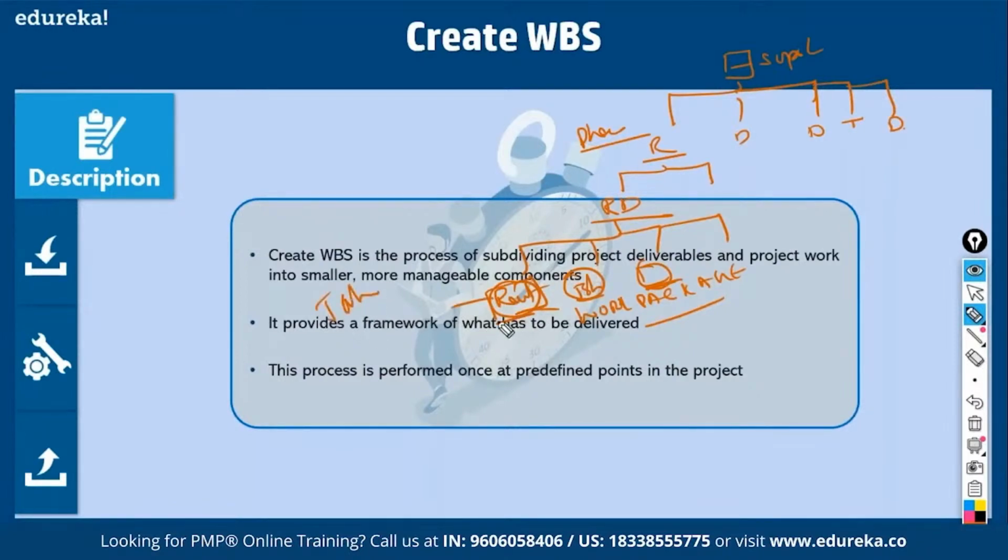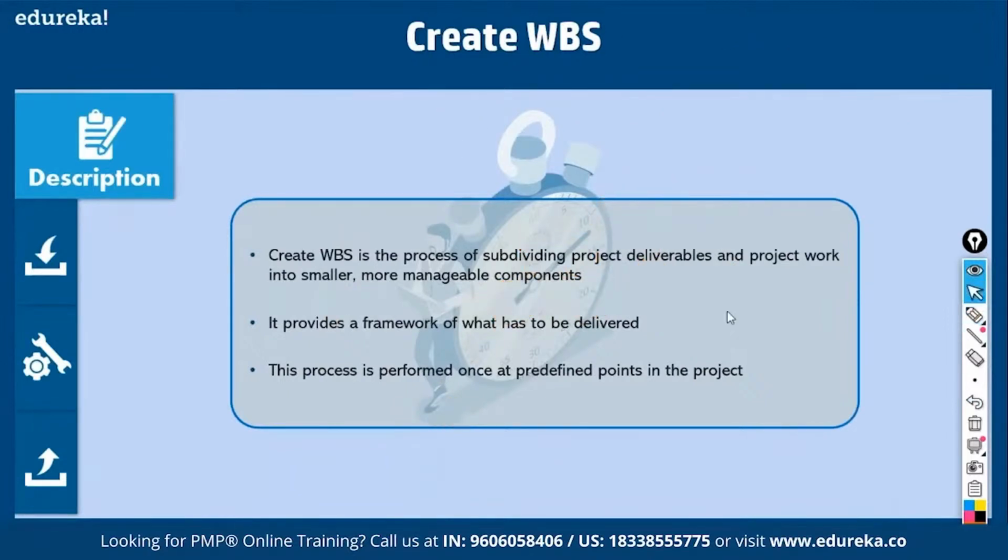John will say, well, these are all the processes I must do. Number one, I have to do a bit of research. Number two, I have to collect requirements. Number three, I have to document requirements. Number four, I have to get a sign off. So like this, you split a work package into activities and plan how to deliver this. So this is called create WBS. This is a very important step in the scope definition process.